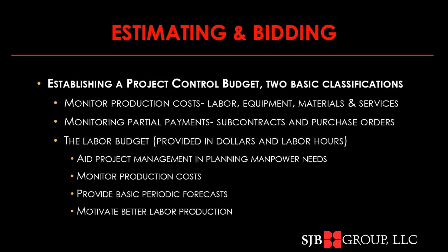Now we're going to take the estimate and use it to establish a project control budget. And this is important because we're going to want to monitor the production costs, our labor use, our equipment use, our materials and our services as we do the work.